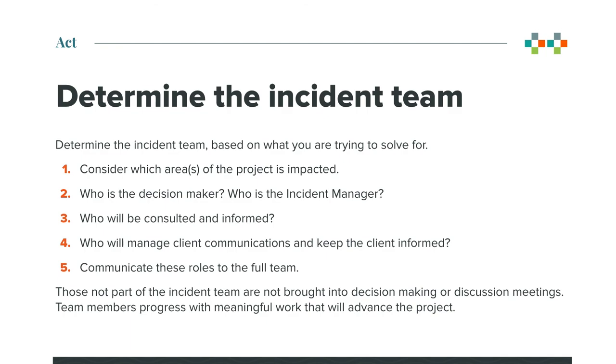Next, you'll determine the incident team based on what you're trying to solve for. So the incident team may change depending on the incident. First, consider which area of the project is impacted. Then determine who the decision maker is and who the incident manager is. Next, determine who will be consulted and who might be informed. Identify the teammate who will manage client communications and keep the client informed of progress. And then finally, communicate these roles to the full team.